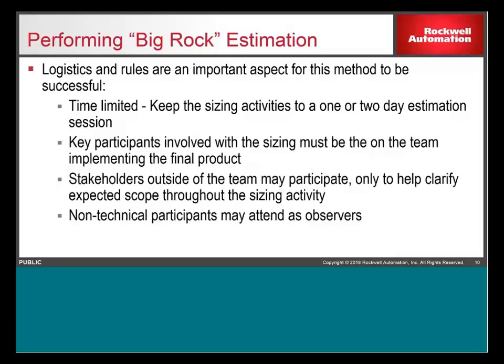All right, so from a logistics standpoint, for this to be successful, you really do need to keep this down to a 1 or 2 day session. Again, like I mentioned before, if you have it too long, you will definitely run into cases where people will get burned out from just being in the meeting and the continuous review of all the different items and the discussions.